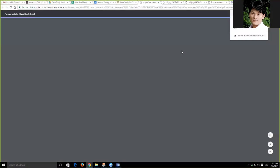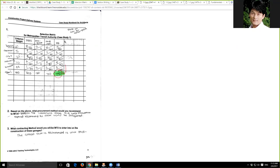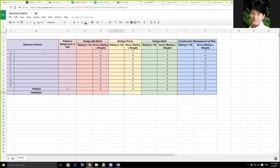The matrix itself is the key piece of the whole evaluation process. If you read the slides, you understand what the selection matrix method is, but I want to reemphasize how you actually use this matrix. When you start doing this work, how do you come up with it? The first column is really the criteria column. To make your life easier, I created a Google Sheets table with selection criteria — as you read through the case, certain things strike out, such as time constraints, budget constraints, public or political pressure, and inexperience of the owner.